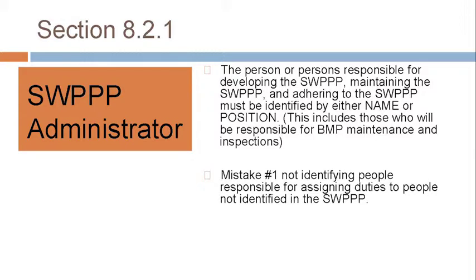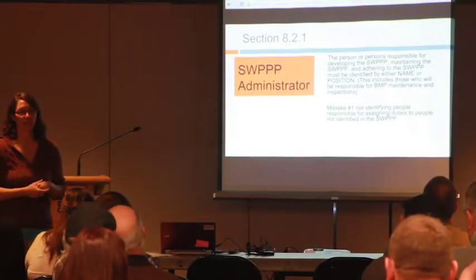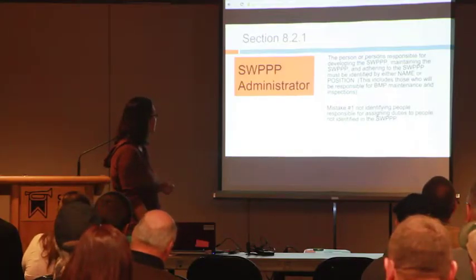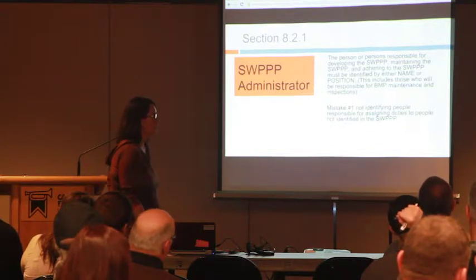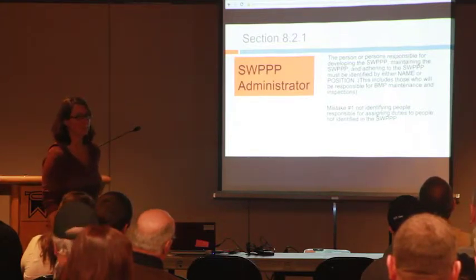Like I said, for your SWIP administrator, you need to identify the person or persons who are going to be doing what aspects, which means that your guy that just started yesterday, unless it's in his job description, you cannot pull him off the street and say, here, go conduct my inspections for me. That's important because that's the guy we're going to contact. That's the person we're going to get a hold of. We're not going to get a hold of just a random laborer out there, because they might not know what's going on. They might not know what's in the SWIP. So we need to know who you're having as authority over this whole site. It's important for us. It's important for you, so we can keep that communication going.